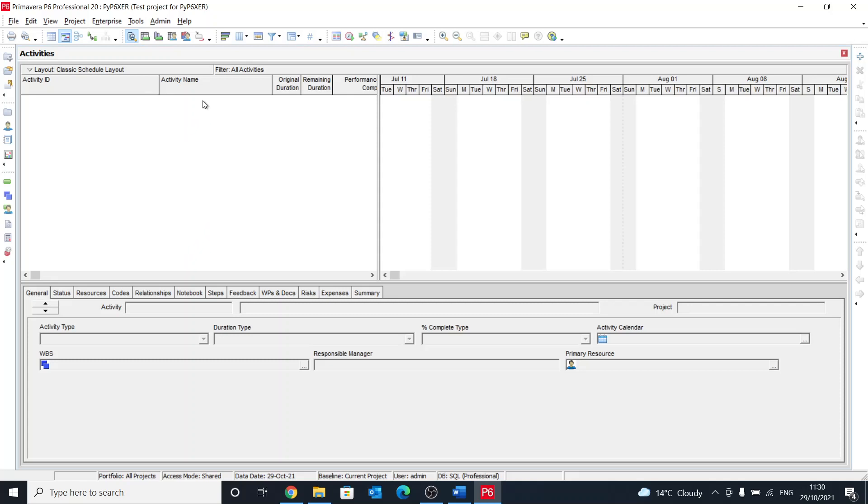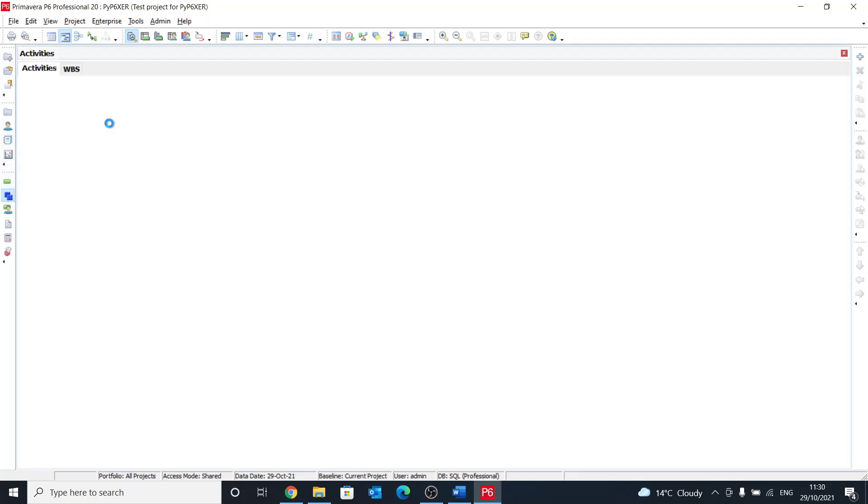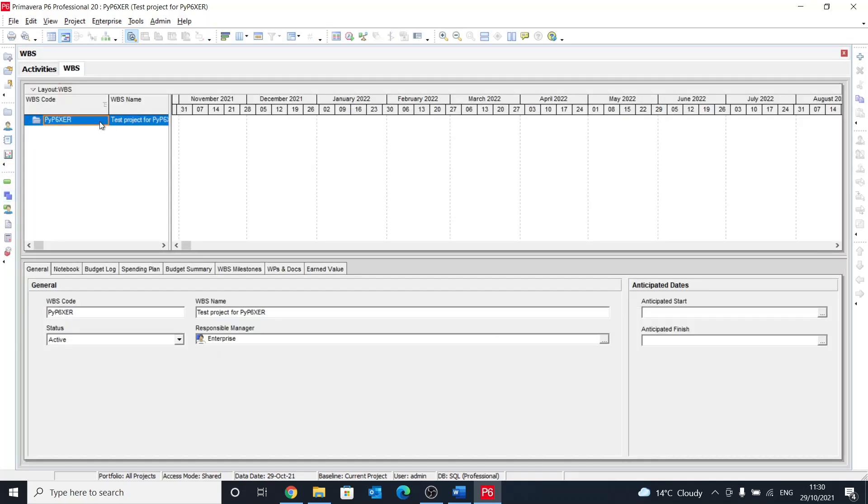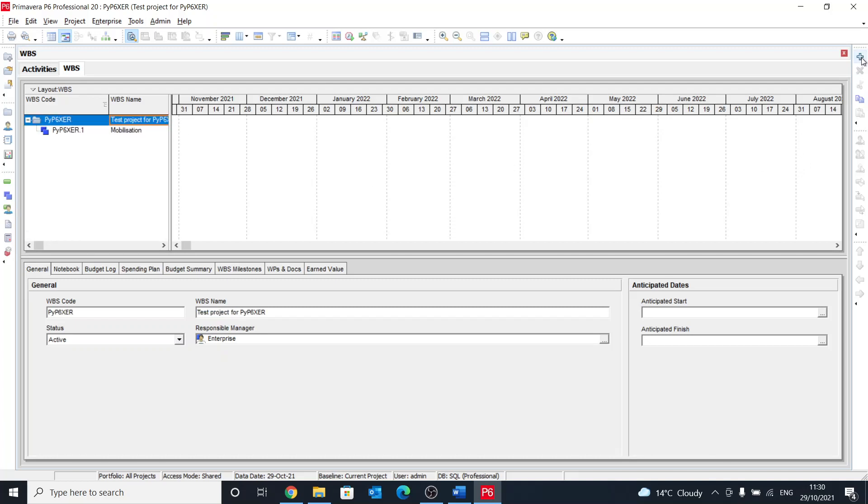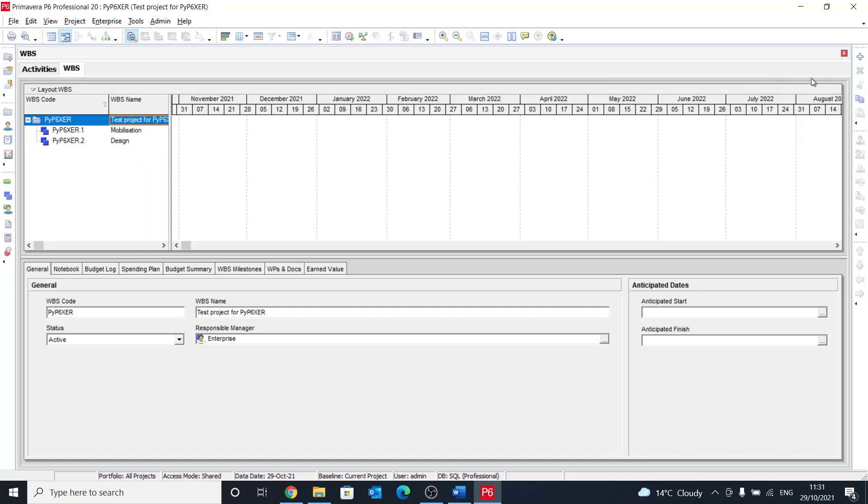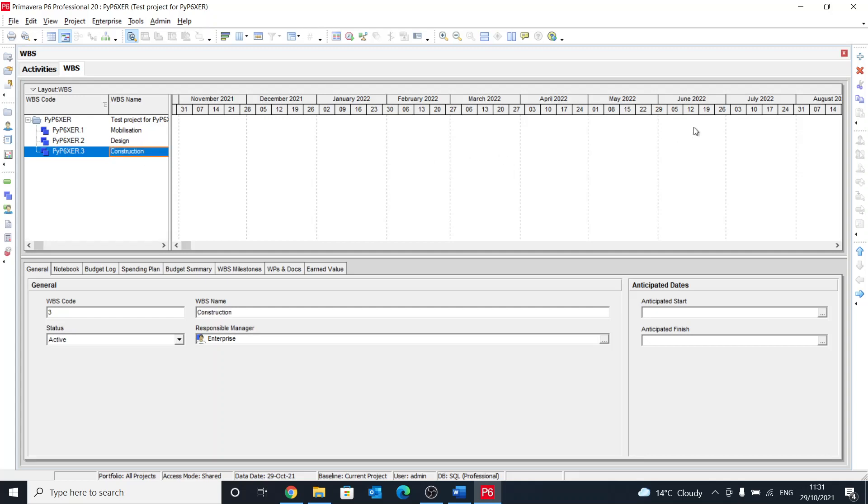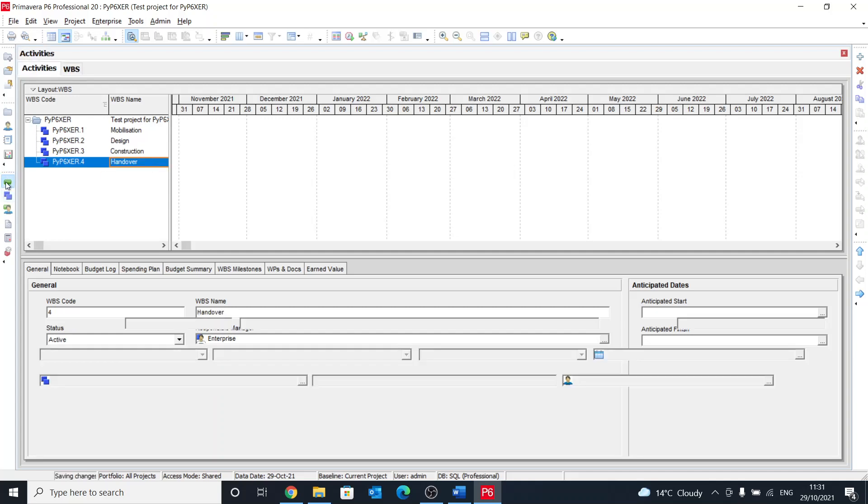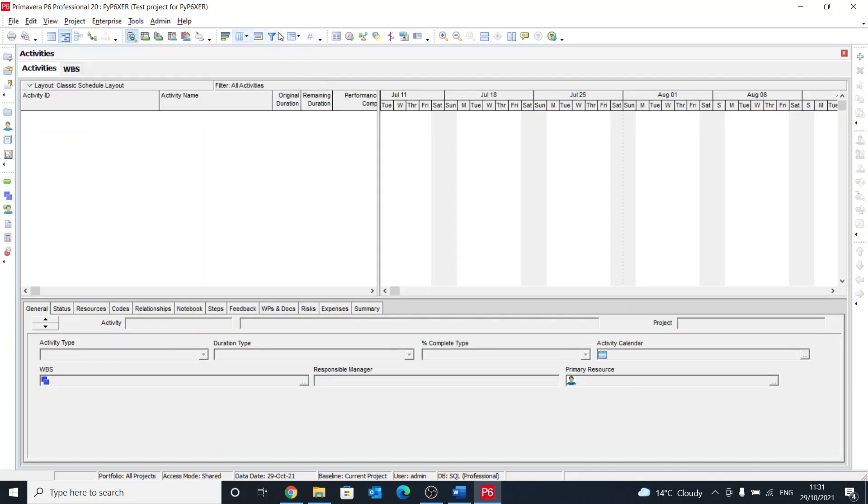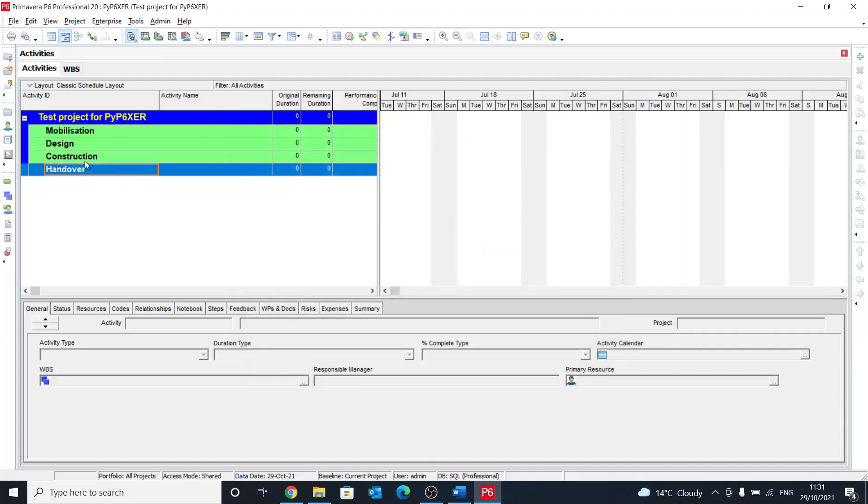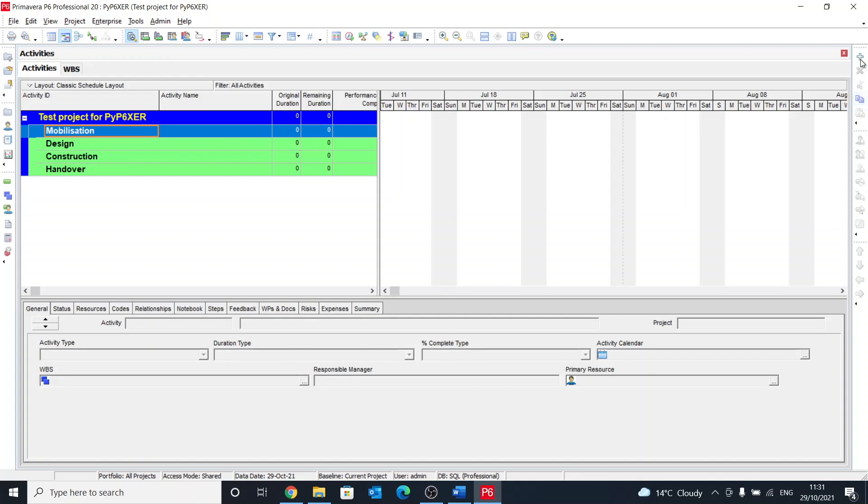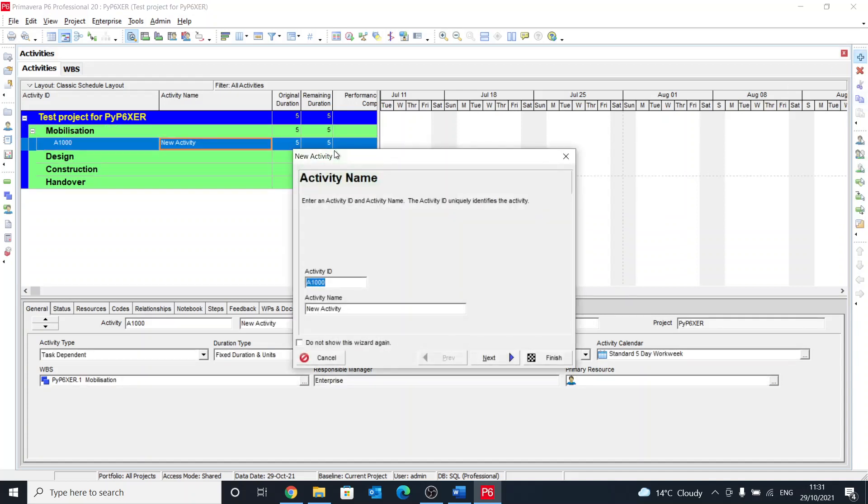What I need to start doing now, I'll create a WBS, a small one. So I have the PyP6XAR and then add WBS, call it mobilization, another one for design, construction, and handover. And then go back to view here and just make sure that I have WBS. I don't have it, so get the WBS on. Now we have everything that we need. So just add one activity under each WBS.